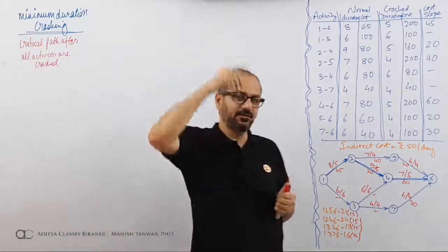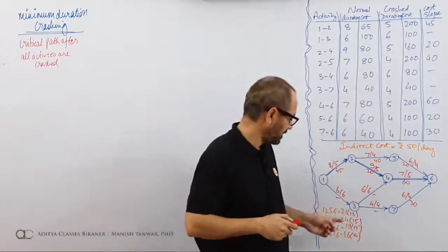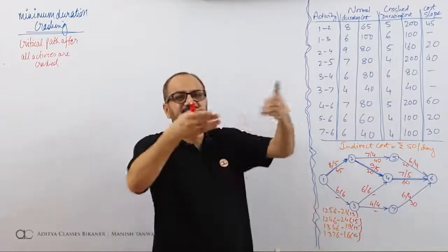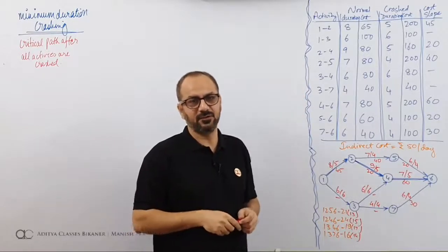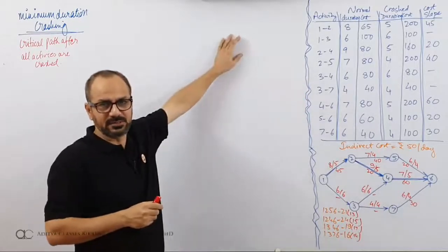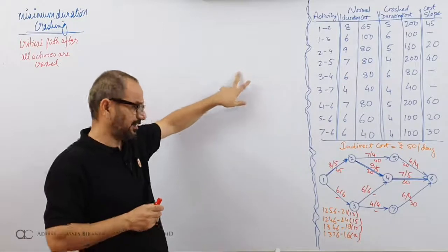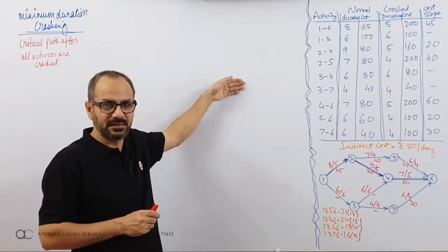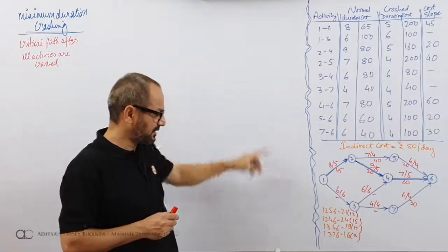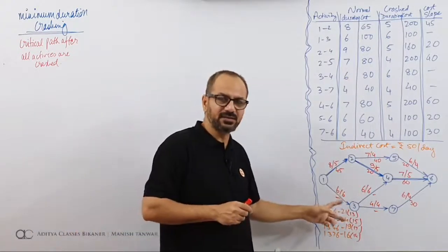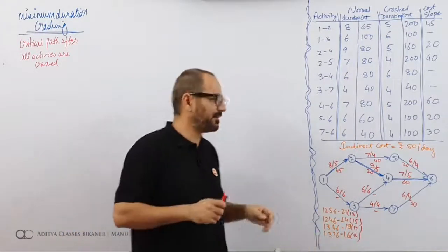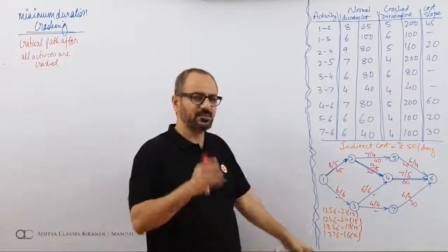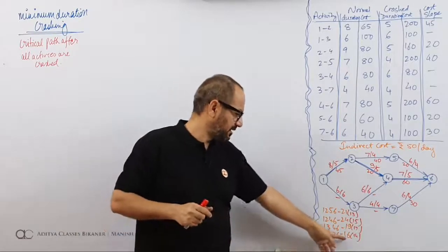Earlier, if you remember the previous question, our benchmark used to be, if I'm at 24, the next critical, that is 21. Then we had two 21s. The next one was 19, so I brought the 21s down to 19. Then the next benchmark was 16, so I had to bring those 19s down to 16. Yes, I remember here by mistake I had put 18 instead of 16. So that should be counted as 16.